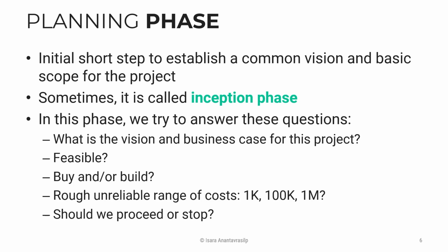Now, whether you are going to buy or build, you might also need to consider how much it costs. Well, in this planning or inception phase, you don't have to be specific. You just have to get some ranges. Does it cost 100,000 baht? Does it cost 500,000 baht? Does it cost 1 million? Does it cost 5 million baht? Something like this, if the project is super large. So you just have some ballpark to play around.